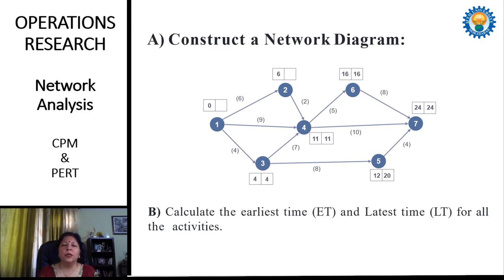Now the next movement going back is on 3 and it becomes 4. On 2 it is 7. And on the last one, since again there are more than two activities going back, we select the minimum, and it is 0. So in this way we have to find the earliest timings and latest timings for each activity. Now in this network diagram we select those events on which these two timings are the same.